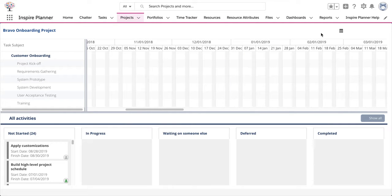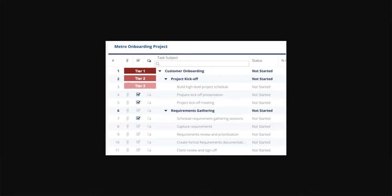The Kanban view only supports up to three tiers of project tasks: the overall project, which is typically your Tier 1; parent tasks, which would be Tier 2; and child tasks, which would be Tier 3. Subtasks beyond the three tiers are not depicted on the Kanban board.